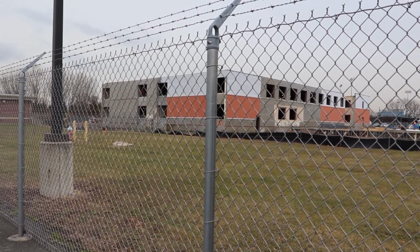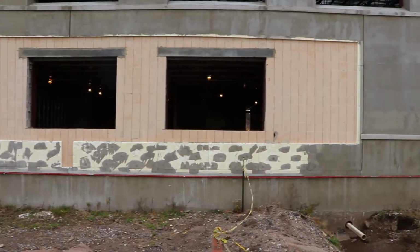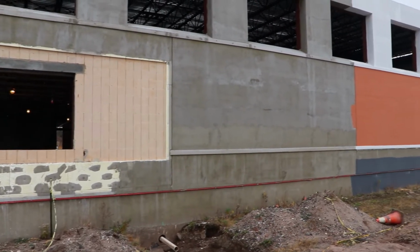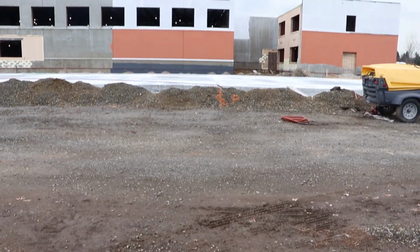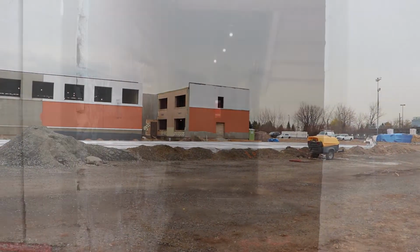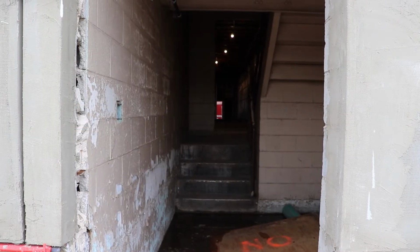Right now, we're installing the mechanical, the heating system, we're installing the plumbing system, we're installing additional structures. There are some small additions to the project. We're installing an elevator. Right now, we're doing the foundation for the elevator. We're also doing the roof. Once the roof is on and we have windows, we can start doing the interior finishes.